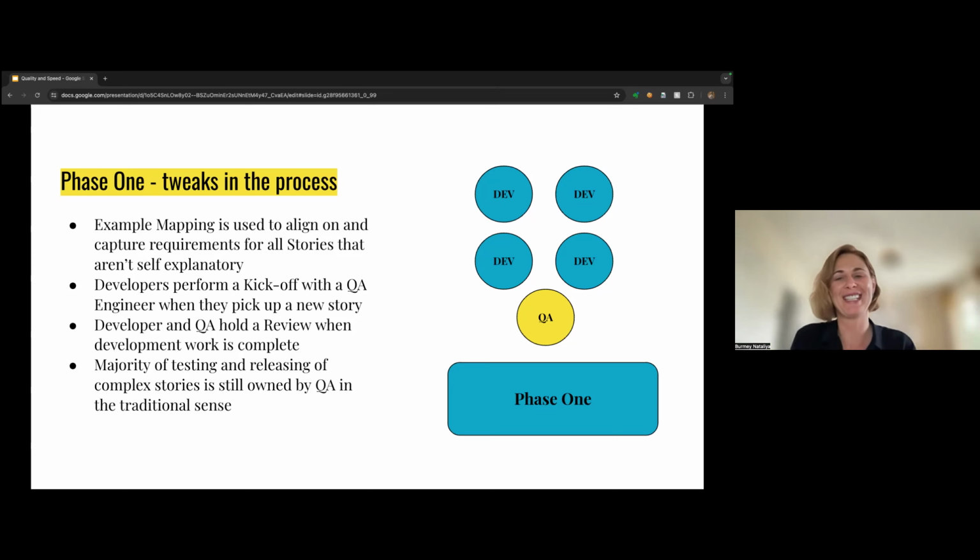It's easy to say, yeah, you have a chat, but what exactly do we have to discuss? So then we realized that we need to have some checklists, for example, to help people highlight what points they can discuss, right? Like functional testing, non-functional testing, where you test, what type of users you test, any integration. So it got better, right?